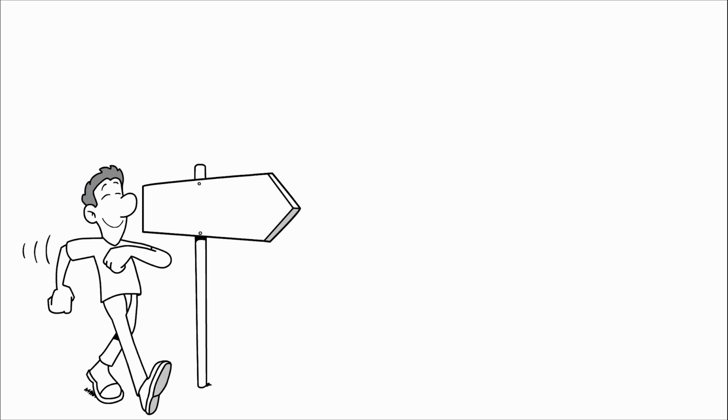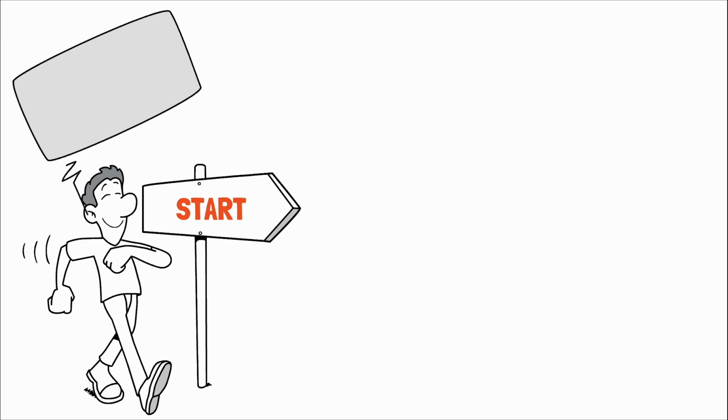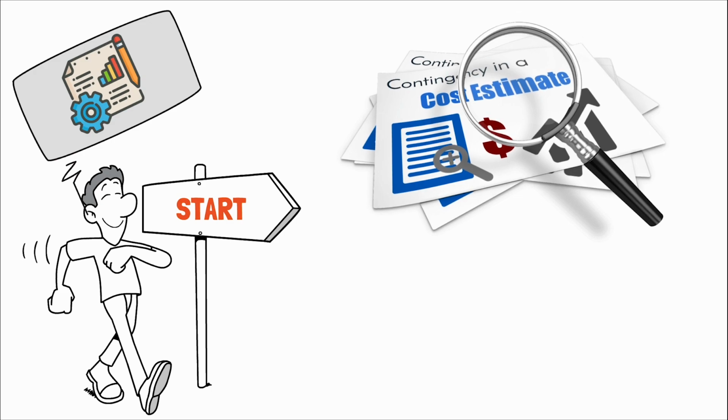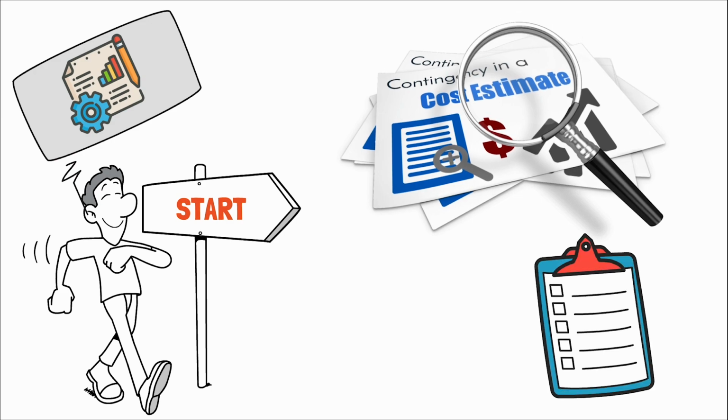Now, imagine you're at the starting line of a project. During initiation, your vision of the project is akin to an impressionist painting, broad strokes and wide margins. Estimates are rough, possibly off by as much as 100%, simply because the details are not yet in focus.